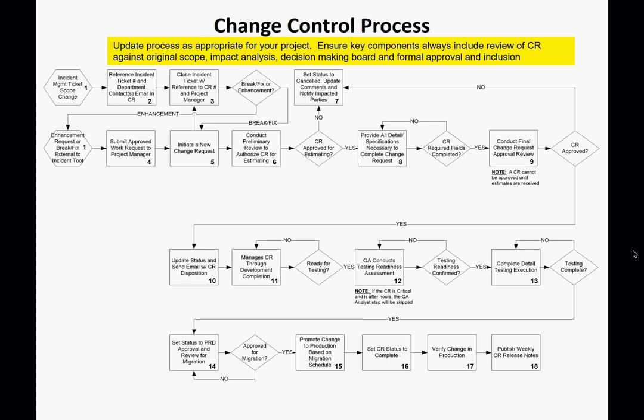It is a meeting where you go to your change request log and filter for new change requests. Then you send to everybody to say we have our change request meeting in two days' time. These are the new change requests.